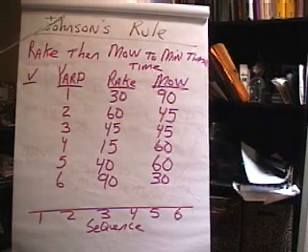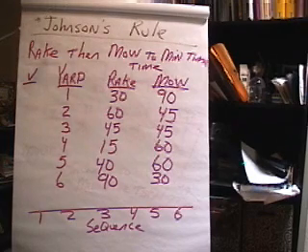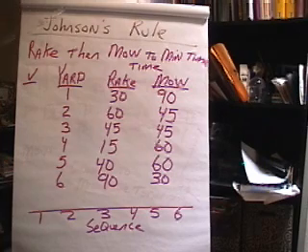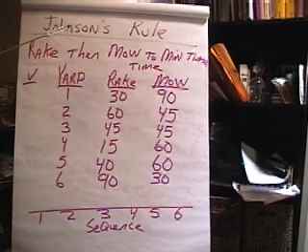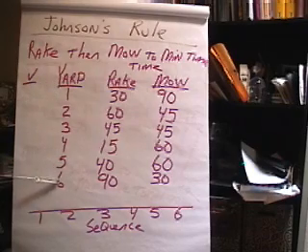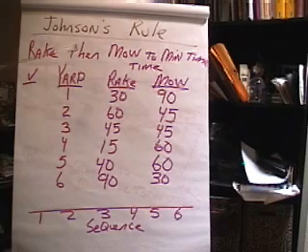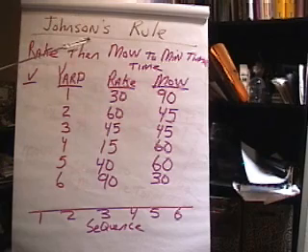Next, I'd like to discuss Johnson's rule, which is a pretty neat little optimization algorithm that can minimize the total time of completing two tasks or set jobs. Let's assume that we've got two partners who are gardeners. One person rakes, and once the raking is completed, then the next person mows the grass. We've got 6 yards, and we'd like to figure out which order to rake and then mow to minimize the total time to complete both tasks.